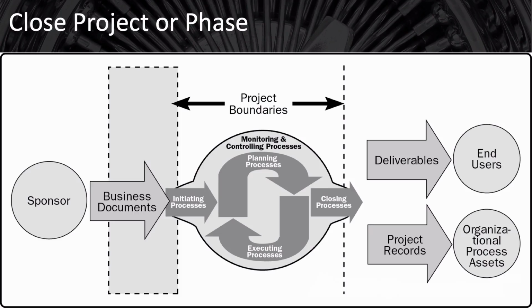This means that you'll be reviewing your project charter, and you'll likely have a phase-specific charter as part of your initiating for each phase. That you'll plan each phase in more detail, if needed, at the beginning of each phase. You'll then execute that phase, monitor and control it, and then close that phase. And that as part of closing that phase, you'll be wrapping up the final product, service, or result transition of that phase and putting your lessons learned from your register into the repository at the end of each phase.